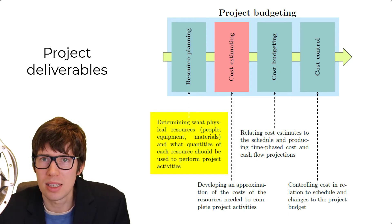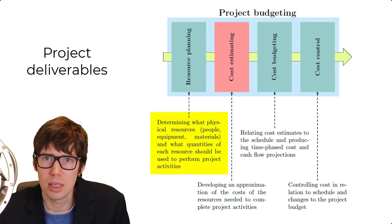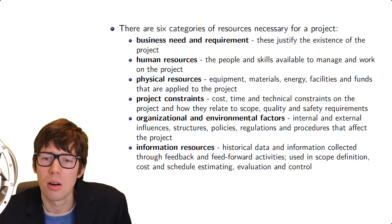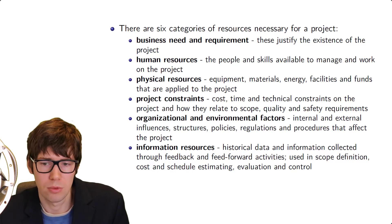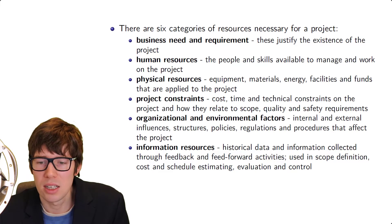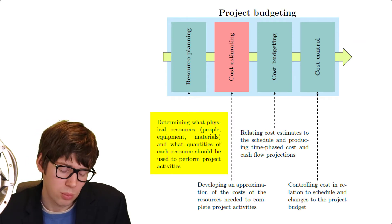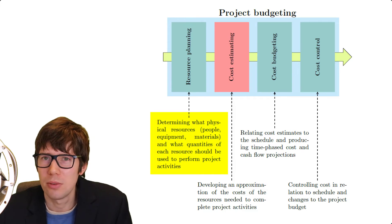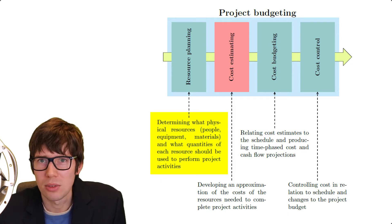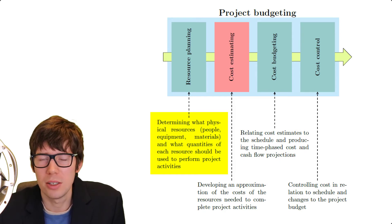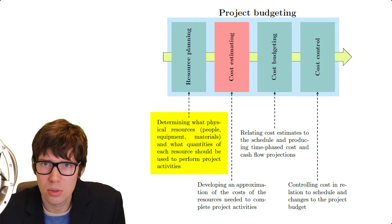The purpose of resource planning is twofold: first, we need to come up with a list of different resources we're going to need for our particular project to deliver the project deliverables; and second, we need to estimate what quantity of each of those resources we're going to need. According to Gardner, there are six fundamental categories of resources: business need and requirement, human resources, physical resources, project constraints, organizational and environmental factors, and information resources. These categories need to be mutually exclusive and collectively exhaustive.